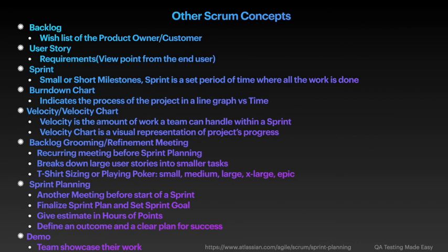It can be 2 or 3 user stories if needed. Grooming session should not be more than 2 hours, but it can be less. Usually the next day the entire team meets again for another meeting, but this time it is sprint planning. Sprint officially starts by kicking off or starting sprint planning.